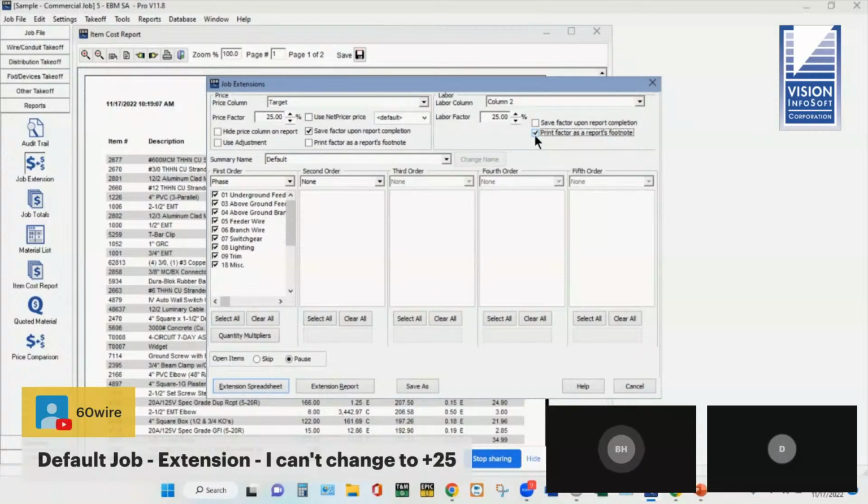So the only recommendation I would give is, if you're doing branch circuits and they're going to be overhead, I would use a beam clamp with the conduit hanger. That's a pretty good item that'll cover most of your conduit support for your branch home runs. It keeps the cost low. It actually builds a little more in than just using a basic strap, but that's something you need to have covered because most of your home runs will be overhead.